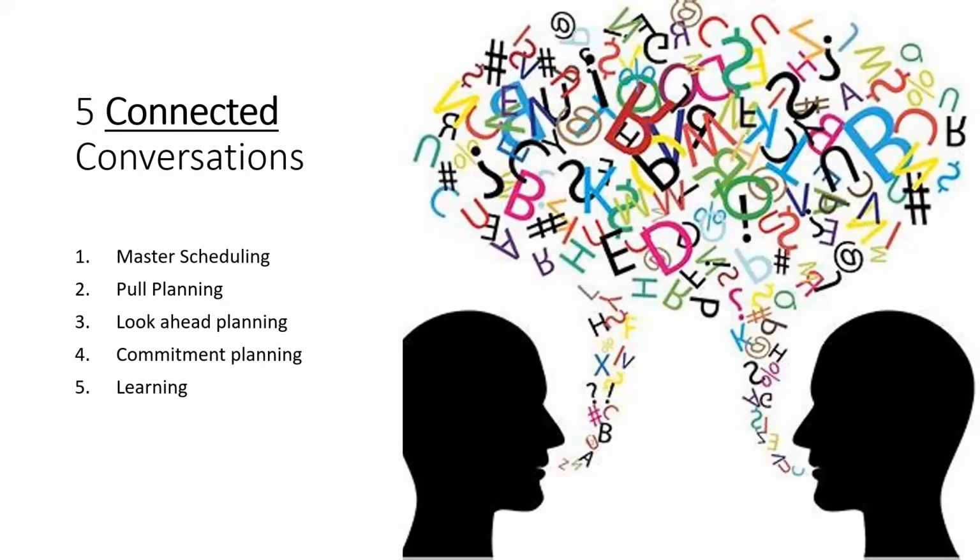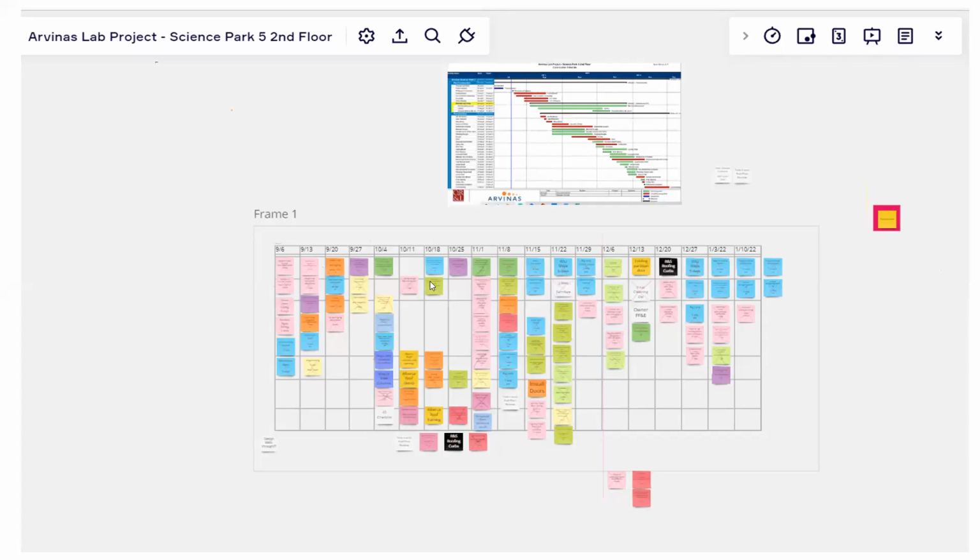And then commitment planning. The commitment planning part is in the daily huddles, where we confirm: you said 3 days, yeah, it's going to take 3 days. And again, I think this is the best we have so far.